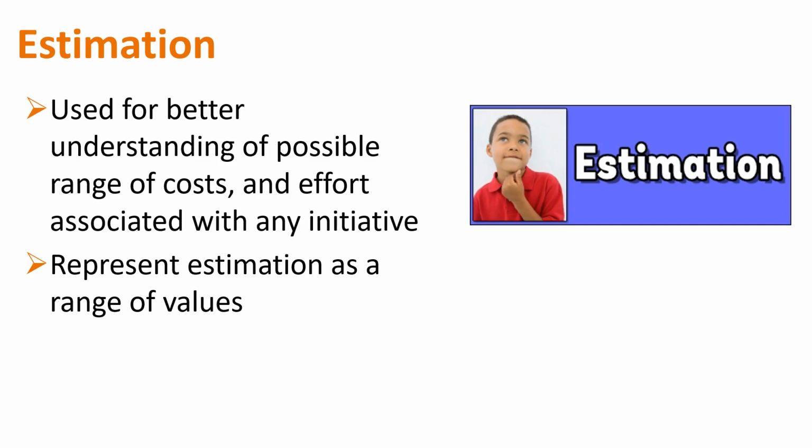And it's harder to justify the expectation I built, because that individual will say, well, I gave you a range. And there's a psychological impact as soon as you give a range. It's a lot harder for us to justify only hearing one value when 2 values are provided. It is easier for us to justify not hearing about, or approximately, or I estimate, or things like that. So we always give a range.